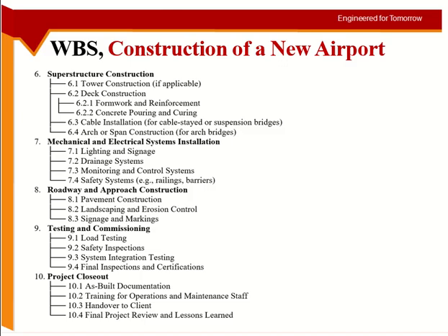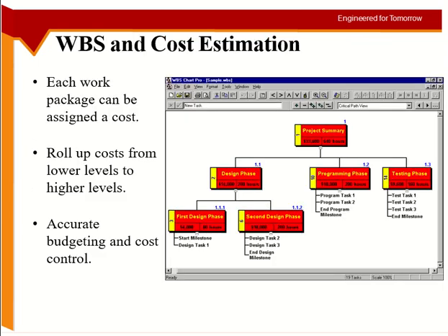So the message was that you decide the phases and the breakdown of your project according to the amount of work required in them. So for a smaller project, procurement may not be a phase, testing and commissioning may not be a phase, because it will just take like 2 hours of going around to do the commissioning and testing and these things. Okay, so moving on,